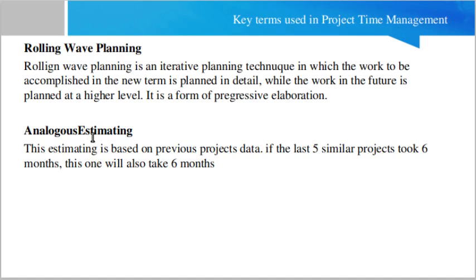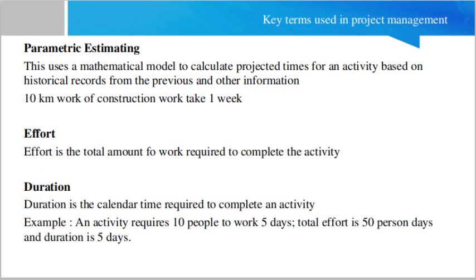The next term is Analogous Estimating. This estimating is based on previous project data. If the last five similar projects took six months, this one will also take six months. For example, if you are implementing an e-commerce solution and previously two or three similar e-commerce projects were completed within six months, you can estimate this similar project will also complete within six months. Note that expert judgment is also required in analogous estimation.